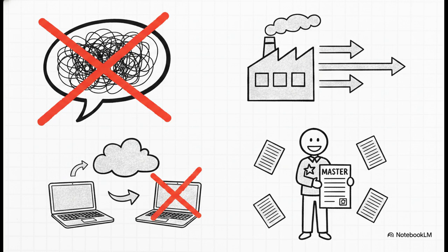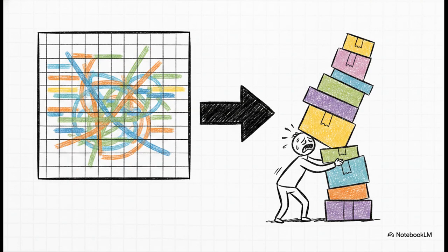Second, accurately segment your tasks so you don't accidentally assign the exact same machine to two different jobs at the exact same time. Third, and guys, this is a classic beginner mistake, store the file in a shared cloud drive, never on a local PC. If the master schedule is trapped on one manager's laptop, it's completely inaccessible and therefore useless to everyone else. Finally, appoint one specific person to manage updates. If everyone edits it at once, you're going to end up with the nightmare of 10 conflicting spreadsheets circulating the office.